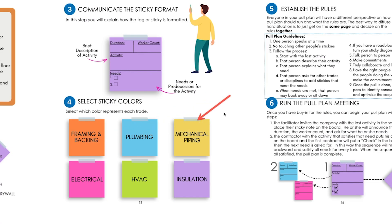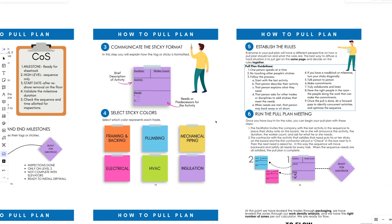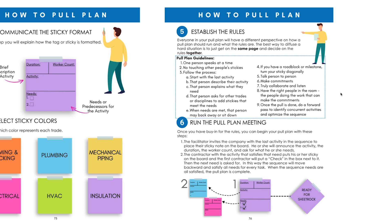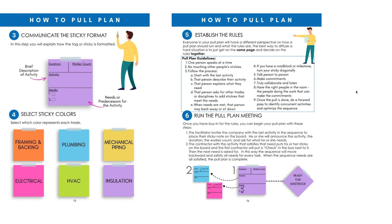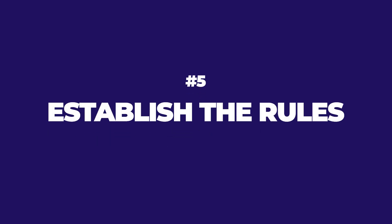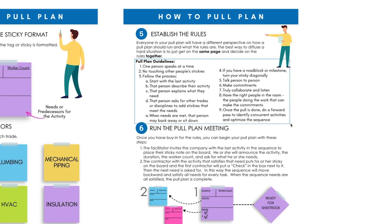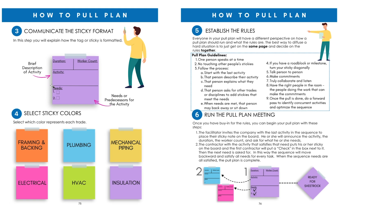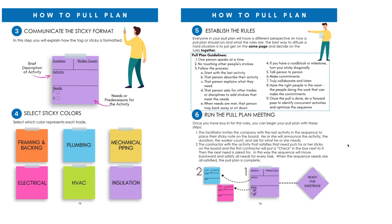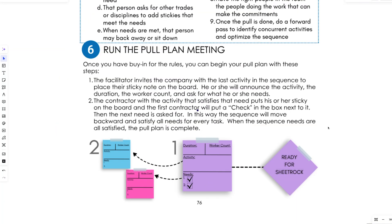Make sure every trade knows what color they are for their tags and stickies so they can get started. Then establish the rules together — everybody has a tinge of nervousness doing their first pull plan, and pull plans can be tough. Common rules include: one person speaks at a time, no touching other people's stickies. Coming up with collective guidelines makes the pull plan fairly stress-free.